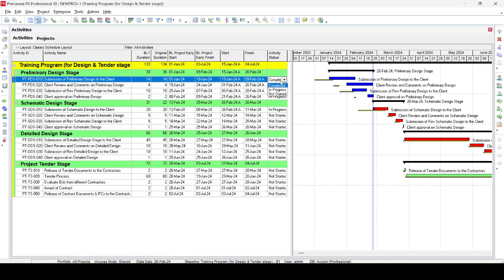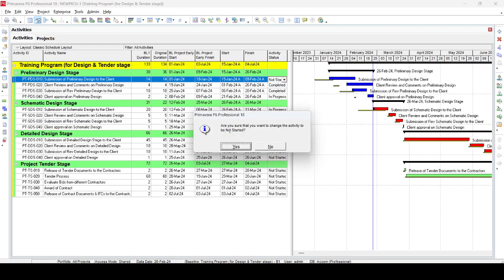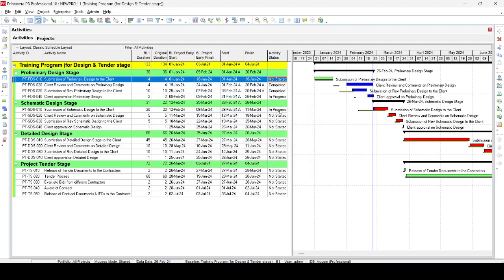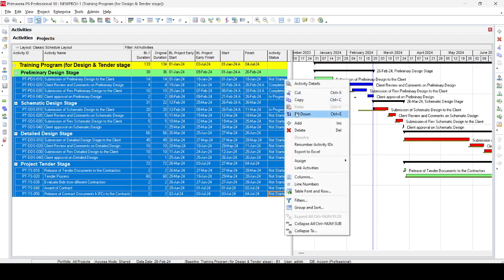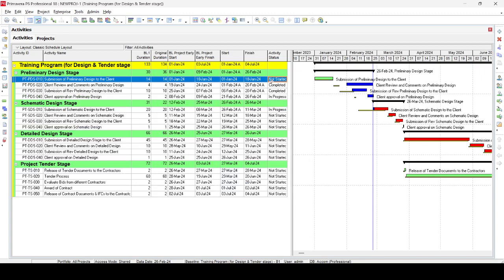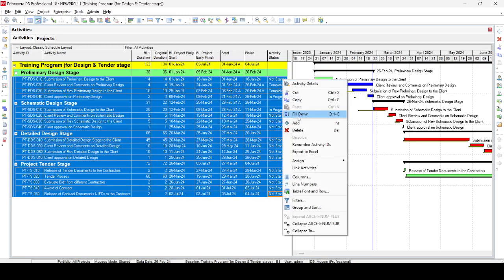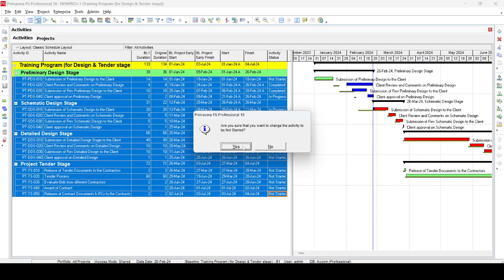Go to the Status column — for an activity showing 'Completed', click it and select 'Not Started'. It will ask for confirmation; click Yes. Repeat for all activities that are completed or in progress. If you have many activities, select all of them, right-click the first column, and use the fill-down button. For programs with many activities, it may be faster to use import/export to Excel, change all completed and in-progress activities to 'Not Started' there, then import back. For few activities, you can do it manually one by one.